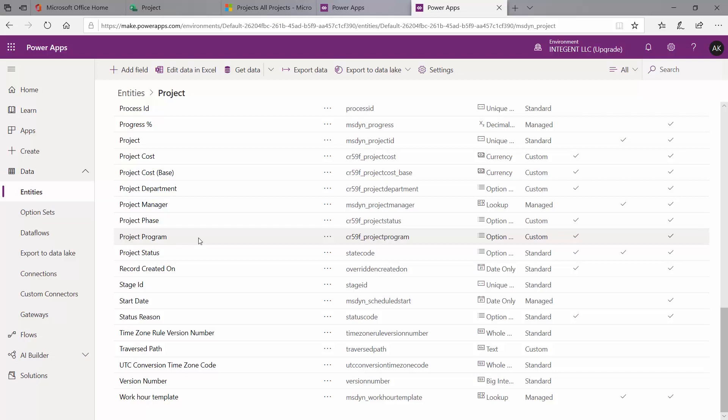What we're going to do today is add a custom section in our form for project status. We're going to add two different fields: one that shows a schedule status — is our project on track, does it need monitoring, or is it in the cannot recover state — which will be a user-selected field with different option sets. We're also going to add a status summary multi-line text field for the project manager to convey the current status, what happened last week, and what's coming up. All of this information can be reported on from the Project for the Web service.